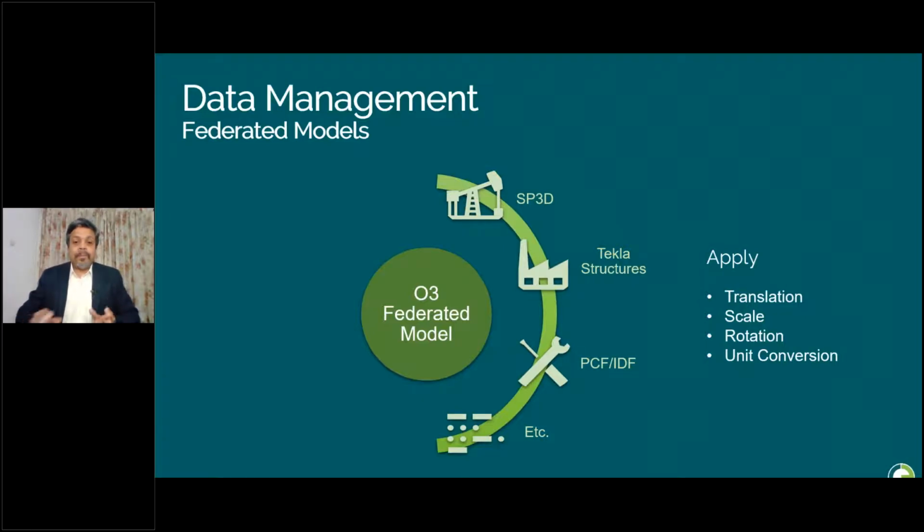For example, for a piping installation IWP scope, we could create a model group with pipe and steel only for a CWP, which will be very convenient for a Workface Planner to do his work. On the other hand, for status visualization or 4D, we could create a federated model of a couple of CWAs, etc.